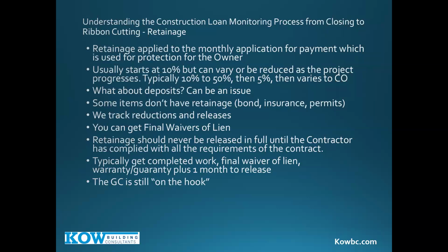One thing I'd caution you is sometimes we'll have projects where deposits will not have retainage held. That gets a little dicey. I understand why it wouldn't. If you have a company that says, look, you're going to turn the machines on and make this stuff, you need to give me $1 million, and it's a big project, okay, they want $1 million. They don't want 900,000 or 950. I understand that. But then it gets a little harder to track later when it comes to work in place and assessing the overall completion. So it's something to look for, something to keep an eye on in the language of the contracts.